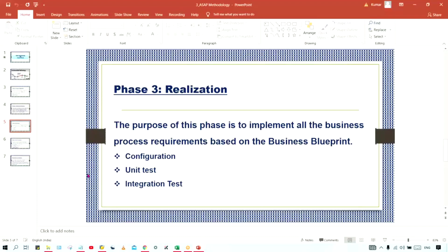They are also going to discuss internally among the team, and then they'll decide, and then they are going to inform us. Sometimes we are expecting data in 24 hours, but it may take 4 or 5 days also, isn't it? So a smart consultant will do multiple configurations simultaneously, so that once I get input for this cash general ledger, I'm going to complete those configurations and perform the testing.